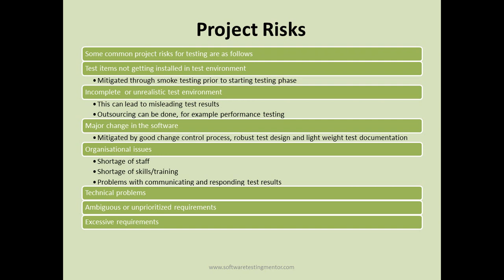Then if there are excessive requirements to be implemented in a very short time frame, that is another project issue. Definitely you won't be able to implement all those requirements in the project. So if there are excessive requirements, that's another issue. Either you need more time to implement those requirements, or you need to discard some of the requirements in order to meet the project schedule.